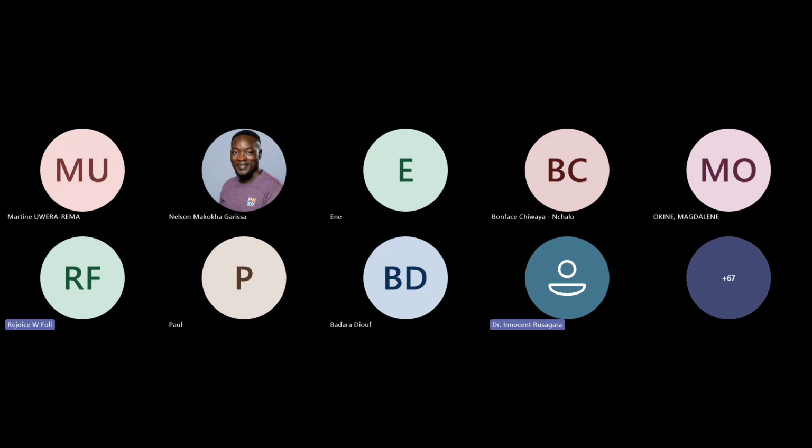So if requirements are not clear, then you have to change. What are you going to change? Do you know what you are going to do? You don't do changes as freely as you want. You have to follow the process, even submitting. What are you going to submit? Because every change does have a change request. So maybe the change request that you can ask, it means maybe let us pause and then go to do a requirements analysis again.